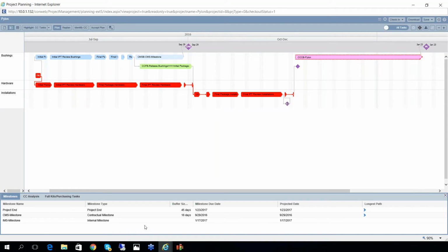Because at the most, what can change is the durations. A lot of these dependencies will not change. All the dependency changes that will happen will be at the subtask level or at the checklist level. And so therefore, this critical path is not going to fluctuate and keep oscillating from one critical path to the next. This critical path is going to remain relatively stable.